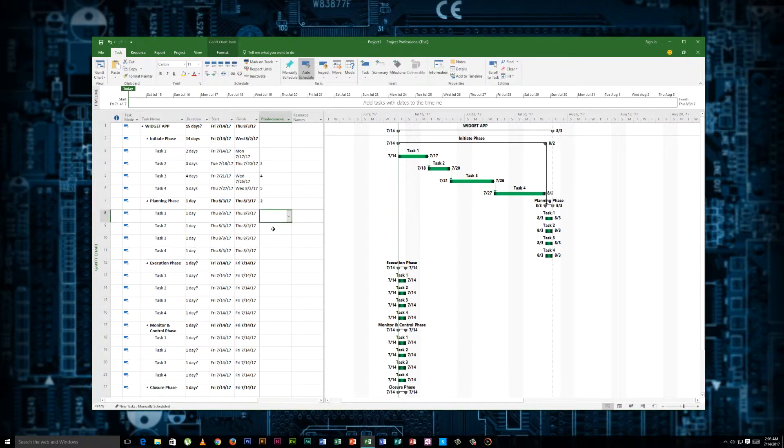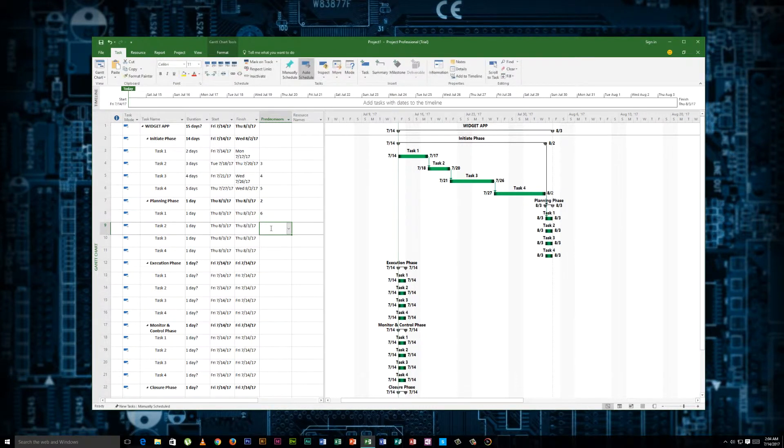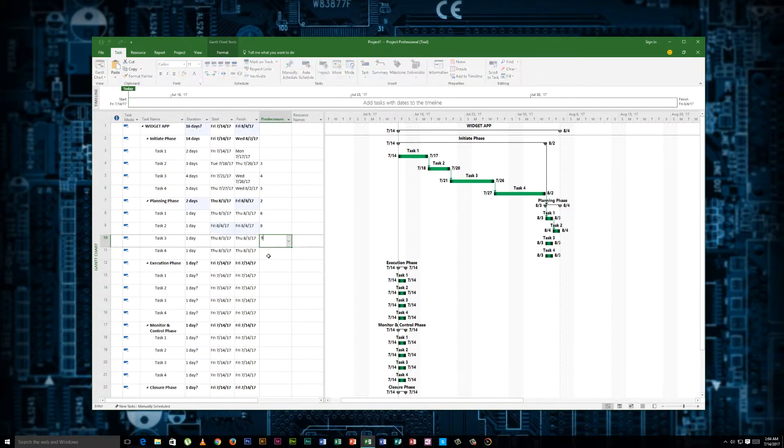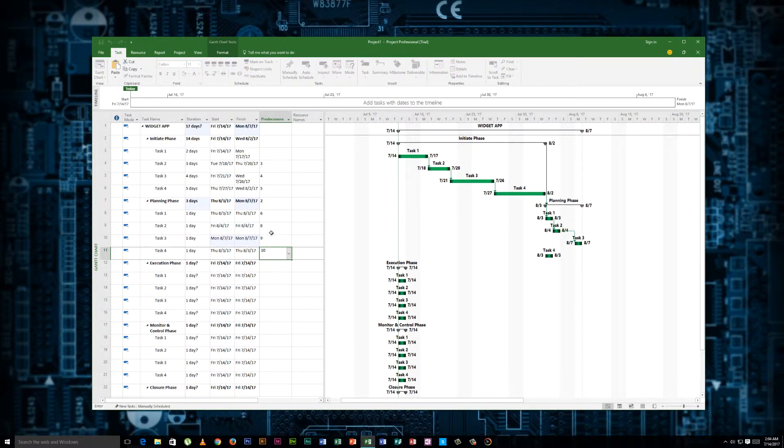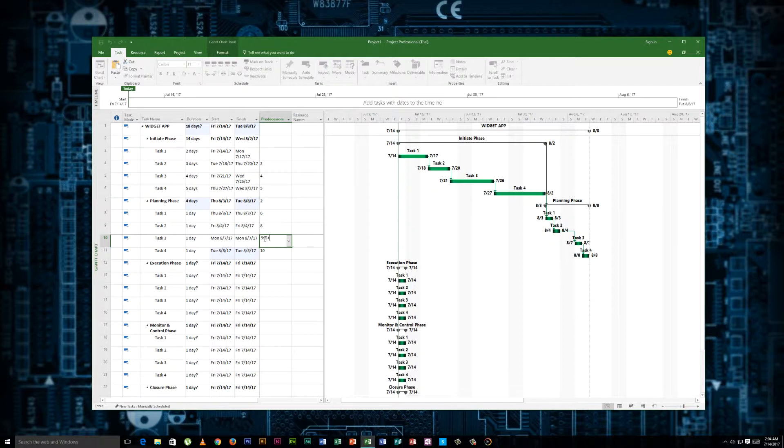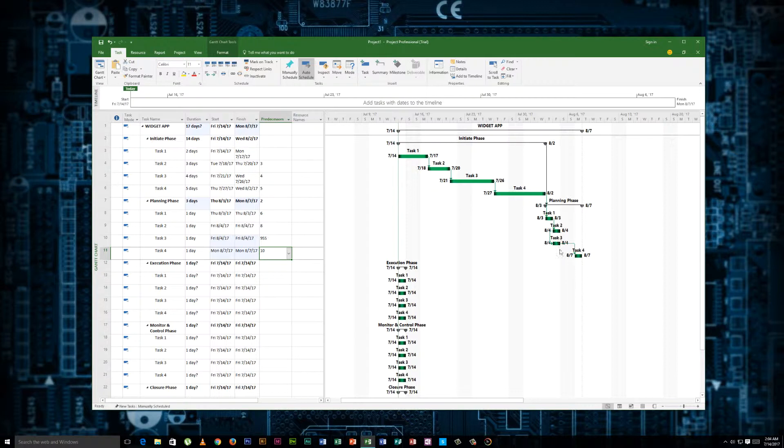So we'll say this has a dependency on six, eight, nine, one, two, and ten. Now just to do a little trick, we'll say nine, start start, plus zero. Now you see what happened here. These two tasks now actually start at the same time because of that relationship. It starts when the other one starts.